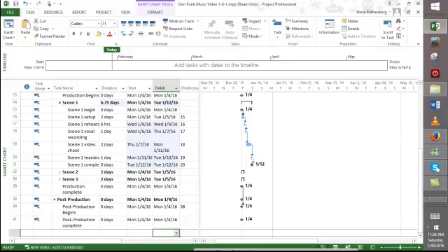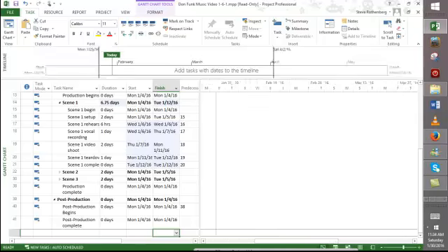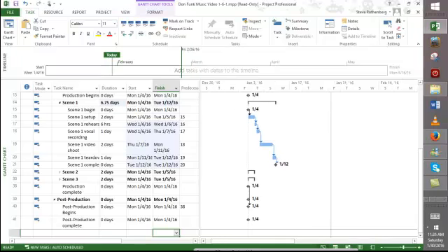Task 14 is actually, if you look at this icon here, and I'll expand it a bit, the summary task now no longer shows a Gantt bar or a diamond for a milestone. It actually shows this bracket. So summary tasks, and you can see them here, they're a little bit smaller because I haven't expanded yet, but this is what a summary task looks like. And by the way, later on in the course, if these don't look prominent enough, you could change the color or the shape or the width or the size of what your summary Gantt chart bars look like to make them stand out more. But by default, this is what they look like.